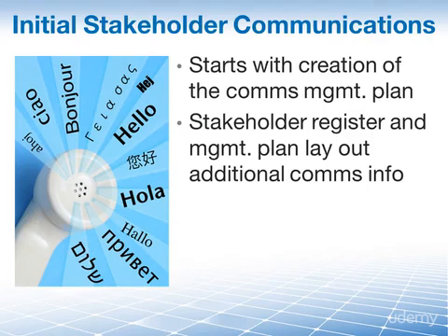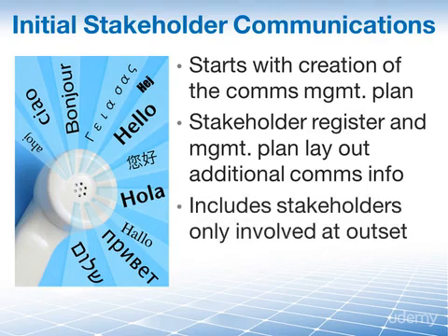It's also important to perform initial stakeholder communication activities with those stakeholders who may only require involvement at the beginning of the project. These could be internal stakeholders who communicate enterprise environmental factors that influence project communication, such as the organization's established communication channels and infrastructures. These could also be external stakeholders, such as legal and regulatory agencies or contracted consultants who stipulate specific communication requirements.